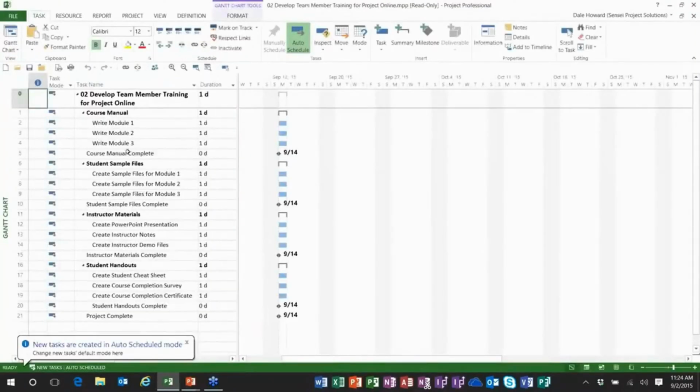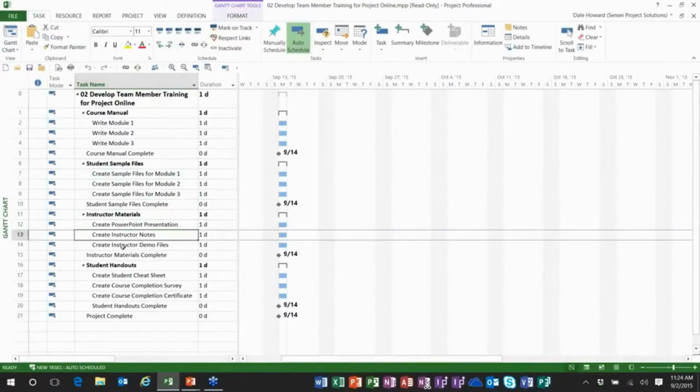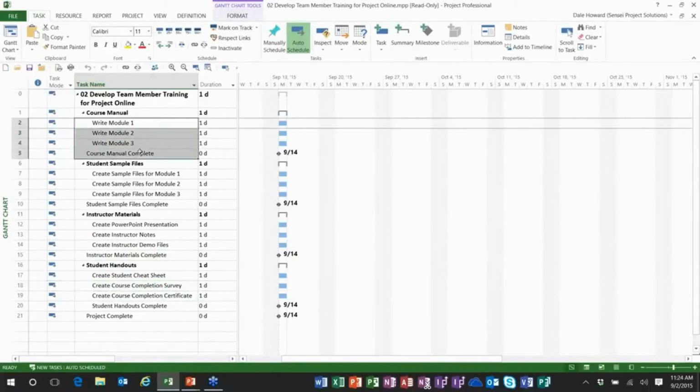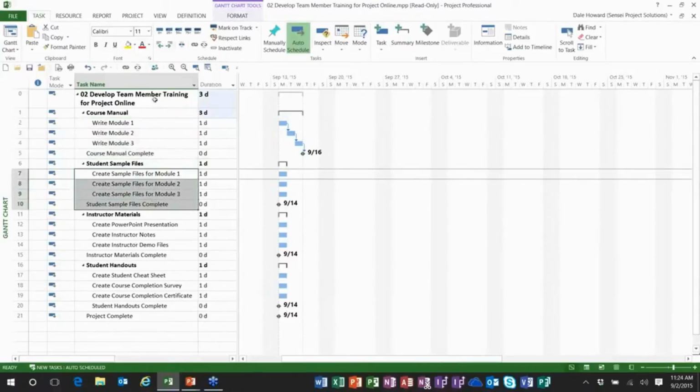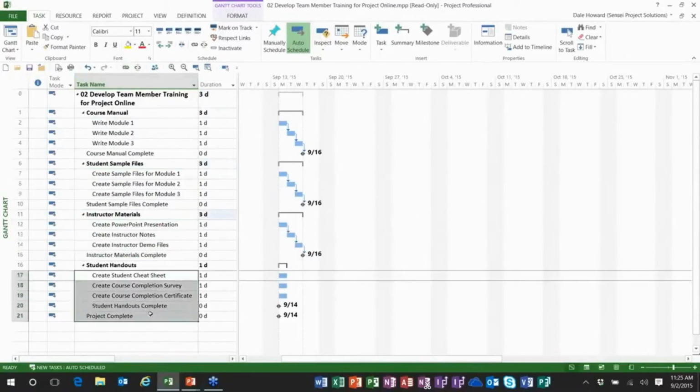So let me get back to Microsoft Project and open my next sample file. I wanted to show you that I've done the complete task planning so far of my deliverables. See how I inserted these detailed tasks of how to actually create each of the deliverables, and now I'm ready to do some sequence or dependency planning. So the task relationships will be this. It's going to be finish to start in the first block. It'll be finish to start in the second block. Really nothing very extraordinary here yet. And it'll be finish to start here as well.